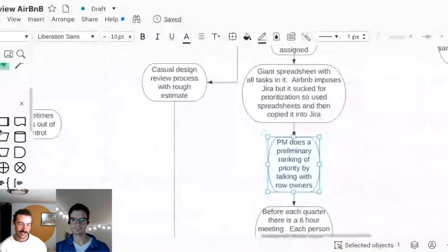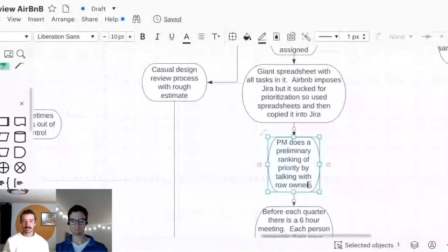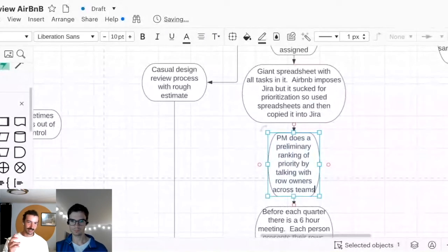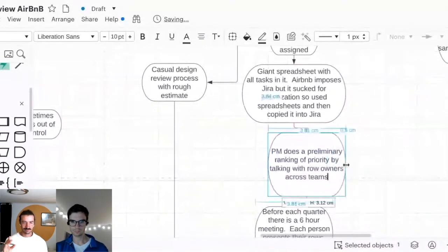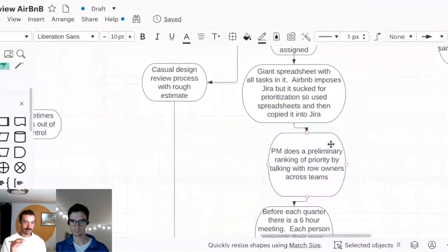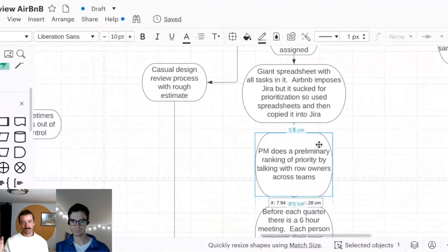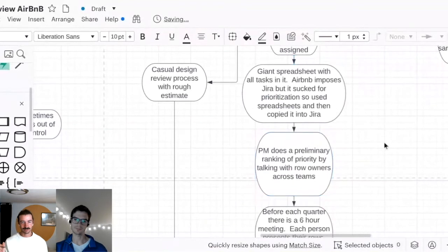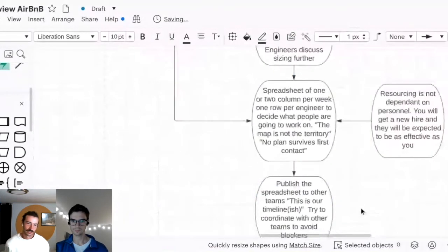So maybe, we need to update this API. A really good example of it would be we did a ton of API stubbing, where we would change our API and not write any code to support the new API. But that API stub is really high priority because it unblocks another team to start working on the integration, even if the data that we're returning is totally false.